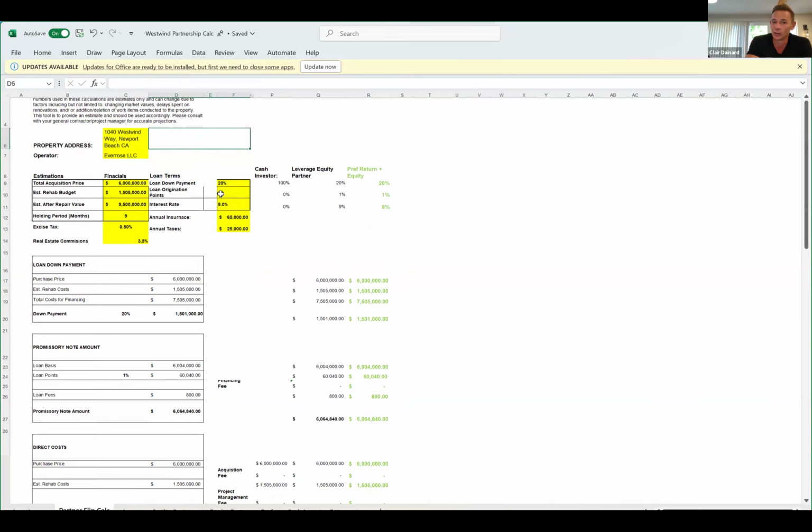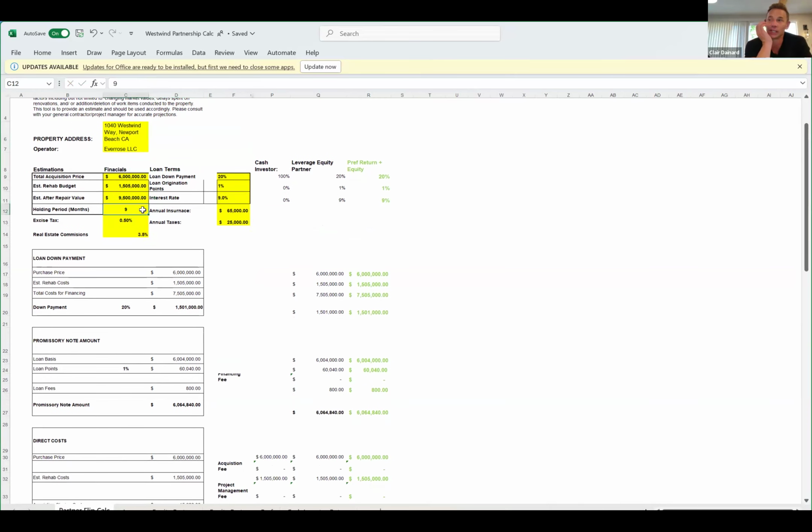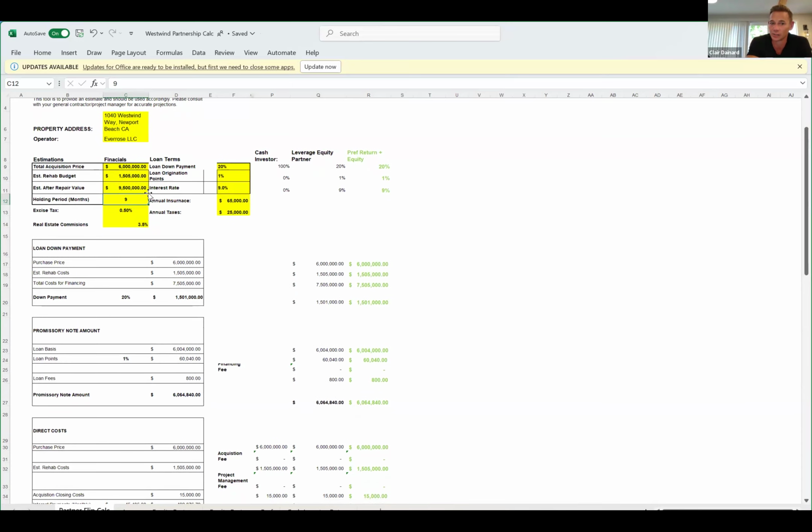When I looked at the deal, they quoted me that they were going to take around 6 months to finish the project, 6 to 7 months. My Performa then was at 9 months because I factored 2 to 3 months to carry on this house. And when I look at the deal, after pricing out, the best bid I'm going to get is around 1.5. So for 9.5, they're done in 9 months.